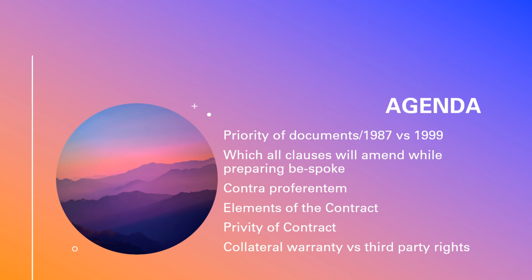Okay. Similarly, let's imagine you are a subcontractor, you have a contract with the main contractor, but this contract is for the benefit of the employer because he is the one who is funding, he is the one who pays. So by privity of contract, even though the contract is for his benefit, he cannot sue. Keep in mind, he is the one funding it, he is the owner of the project, but still he can't sue a contractor or subcontractor because the contract is between the subcontractor and the contractor.